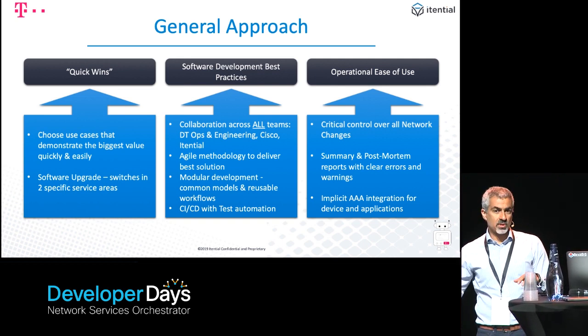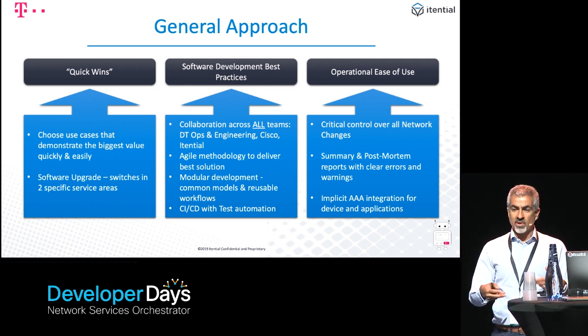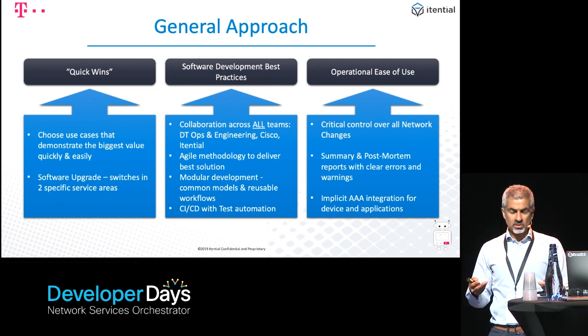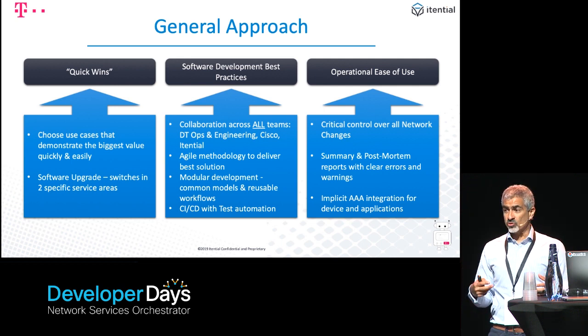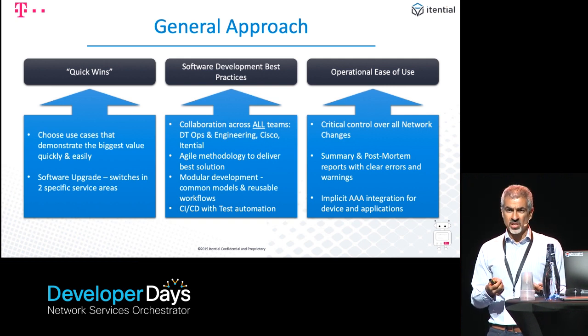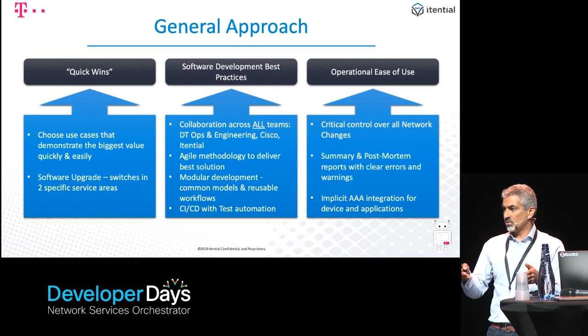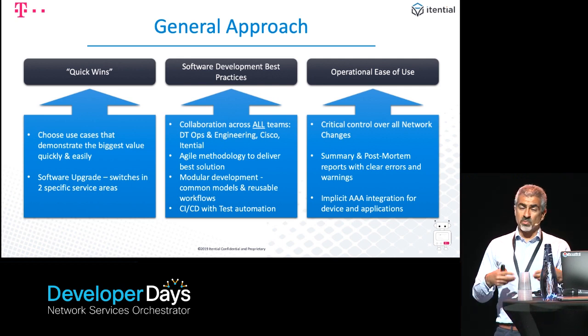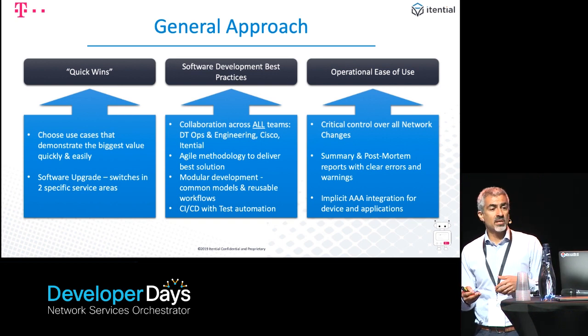And the reason it's better is because the team who've been building these things together have been able to demonstrate, regularly, every 2-3 weeks, the progress they're making, so that the stakeholders, all the people that have a vested interest, can feed back and say, actually, it's not quite what I thought about when I mentioned this initially. Do you mind if we change this, that, and the other? And we do need to control the level of change, but we need to provide the opportunity and the framework in which this change can occur. So I think the solution that we have today is far better because of it.